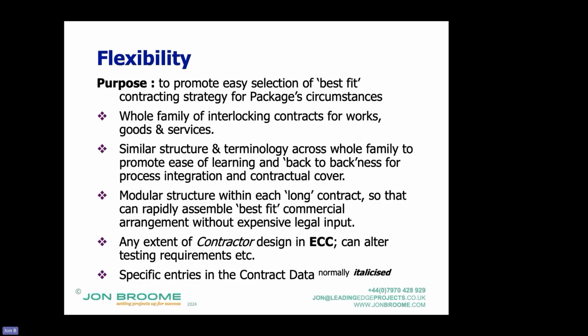So, for instance, on a target cost contract, if I don't want 50-50 pain gain, I can just alter the entries in the contract data to change it to whatever I want. If I want a defects date, which is the amount of time the contractor has a maintenance liability, if you like, or an obligation to come back and correct defects, I can put whatever. It's normally 1 year, but I could put 2 years in.